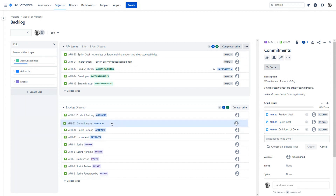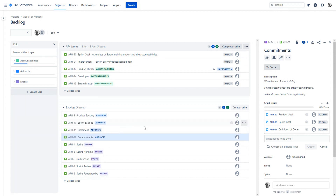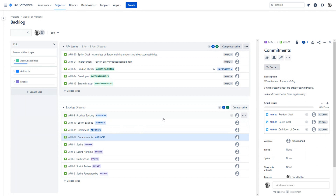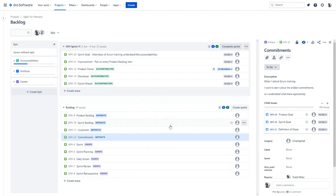As Ryan mentioned, a couple things you could do: add details, estimates, decompose, talk about the future. The Scrum Guide recommends that this doesn't take more than 10% of the developers' time. You can see here, we added a little bit of detail, we did a little bit of reordering, and we're off to continue working on our sprint.